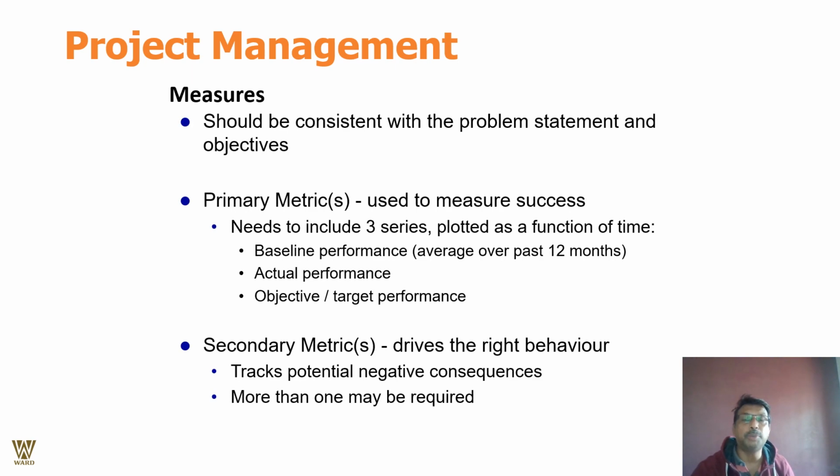Let me go with the measures part of it. What you measure should be consistent with respect to your problem and objective. The primary metric used to measure success needs to include three series plotted as a function of time. What are we looking at? Baseline performance. Actual performance. Objective and target performance.